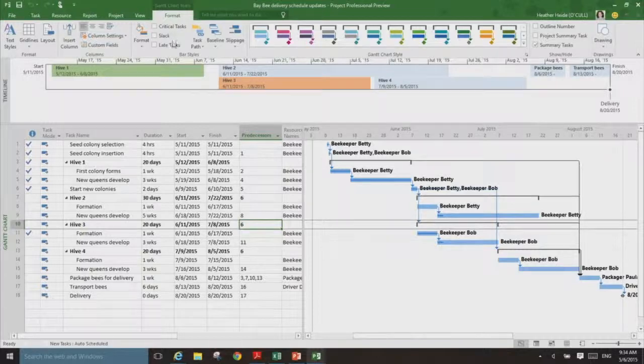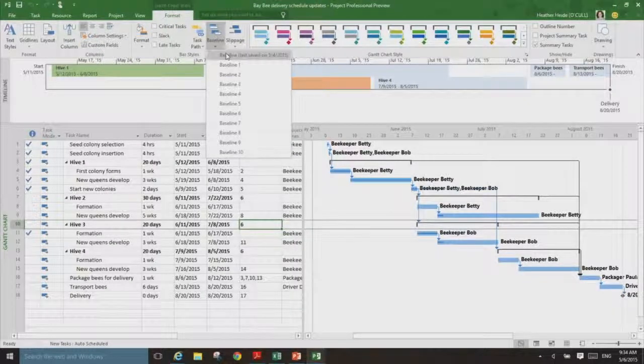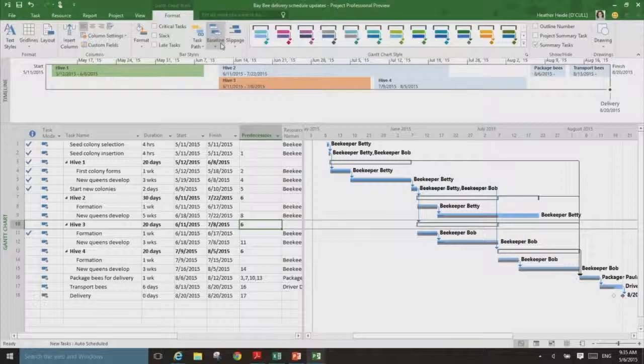So Eli talked about the Gantt chart. There's a lot of analysis you can just do right there. To make that a little bigger, if you come to your Gantt chart format tab, we have all these different settings you can turn on. Since Eli had saved a baseline, and say our project slipped a little since he saved it, I can come here and display that baseline, and I now get a gray bar down here, which is basically representing those baseline dates that I had saved, the baseline start and the baseline finish.